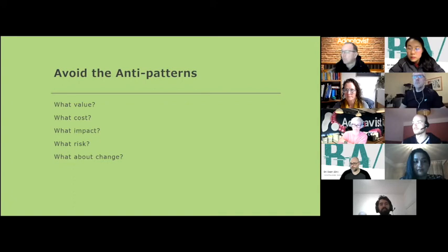If you're thinking about collecting the stories for future sprints, let's think about these five questions. What value does that story have? Is it something we're definitely committed to doing? Because if it's not prioritized, sized, ranked and planned, the value of writing a hugely detailed storyline is minimal at that point in time. But when you come to each of those stages in the Agile process, ranking it, estimating, putting it into the actual sprint and committing to deliver, you need more information.